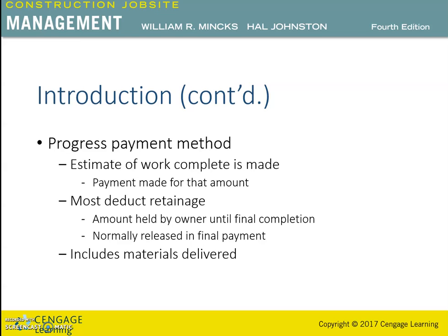Materials delivered to the job site, even when not actually incorporated into the work, is usually included in the progress payment. So special care is normally taken to inventory the material stored at the job site. So some owners will also include material stored away from the job site in the progress payment with special provisions. It is necessary to assure the owner that the material is insured and will be installed during the project.